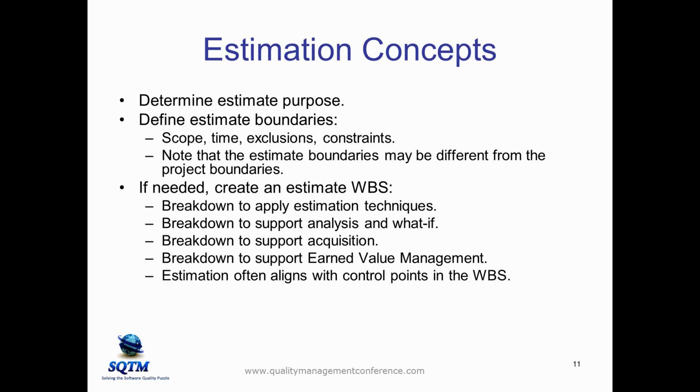And so we can actually structure our estimate in a way that we'll be able to measure and verify the work that's completed. So once again, by having the estimate in the form of these high-level objects, which are traceable back to useful functionality, that actually inherently supports an improved earned value management.